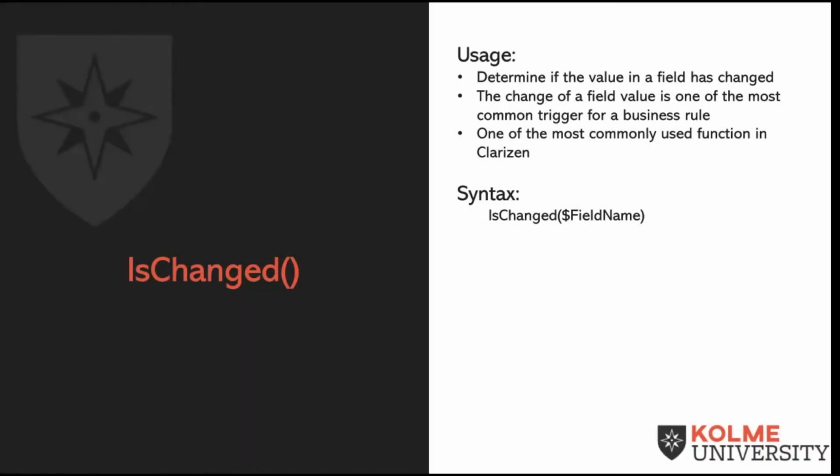That's right, Bianca. This is a really important function. It's really key for good business practices, good configuration practices in a lot of our business rules. Clarizen workflow rules can be set to trigger when an object within a project or a request is changed. And if we don't use IsChanged to specify the exact nature of the change, for example, like a state change within a request, it will then trigger on any change within the object. Yeah, that's right. And that's why this is very important for changes.